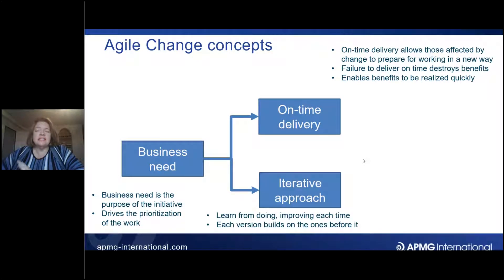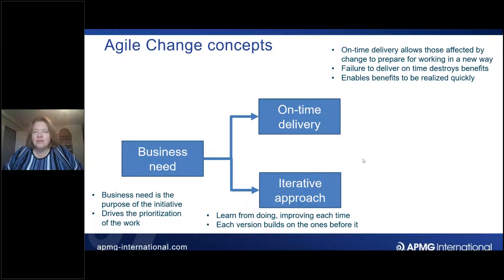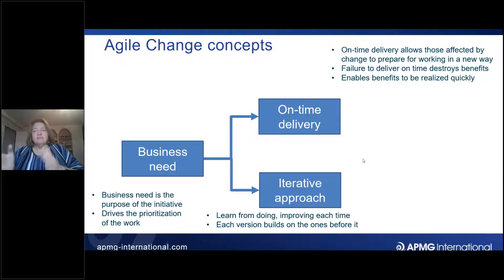The other key idea is iterations — what some methodologies call a tranche, stage, phase, wave, or chunk. By chunking things up, we can get something out early, test it, get feedback, see if it's having the effect we thought, and then build on it. That early feedback is useful, but so is the early return on investment. On-time delivery in short waves or bursts of change is really helpful.